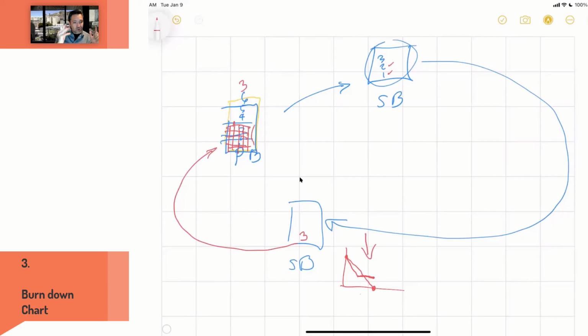And what you need to do before starting a new sprint is the grooming of this. And if you remember grooming, reorganization, reprioritization, re-estimation. Maybe I need to change the estimation for 3 because I didn't finish. Maybe I didn't finish because I think it was easy to do. We as a team put a 1 as the story points. It's really easy, but we figure out that it's not 1, it's 20, 100, whatever.